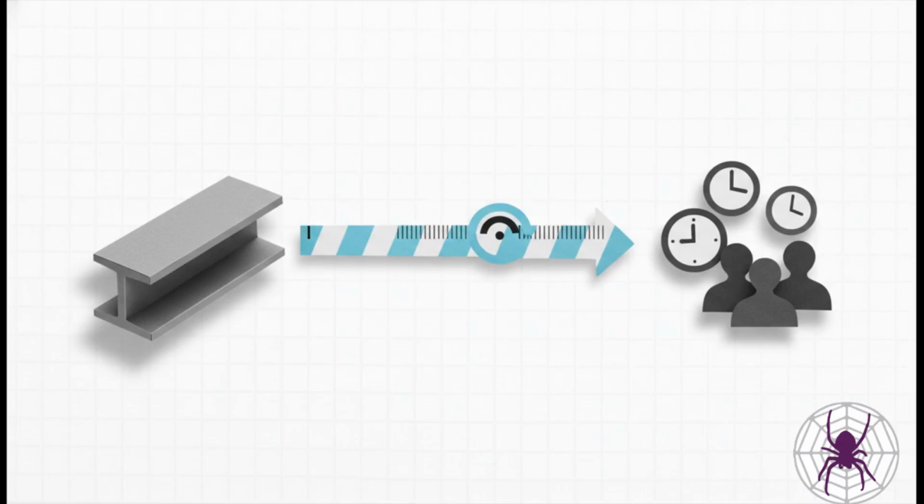Now, to make this man-hour really useful, we have to standardize it. And that's where the productivity index, or IP, comes in. Think of it like a recipe. It tells you exactly how many man-hours you need for one specific task, like, say, installing 1 ton of steel.